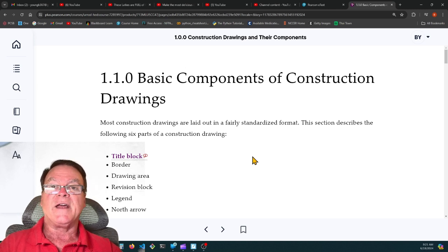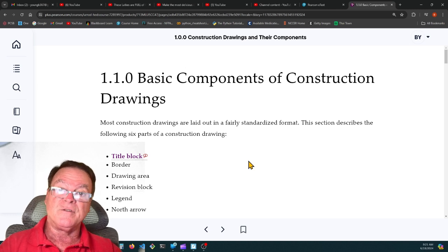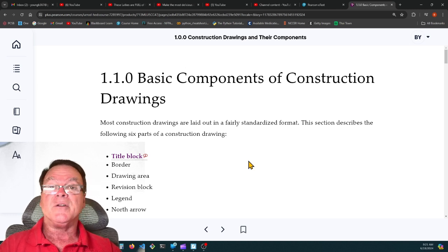So don't fall into that trap of trying to be a nice guy and just do someone a solid. Yeah, I can move them. That's 18 inches. I can just move them over. No, it has to come down the chain of command from the architect to the general foreman to your foreman to you, and then you can move.